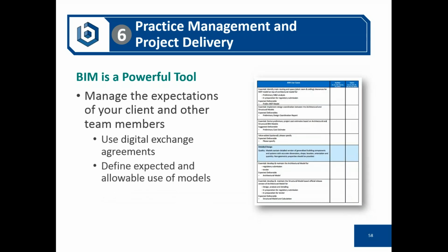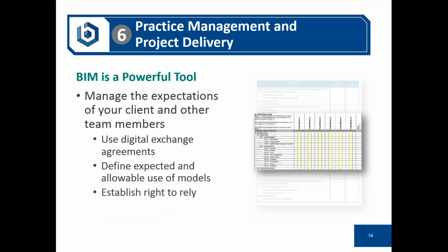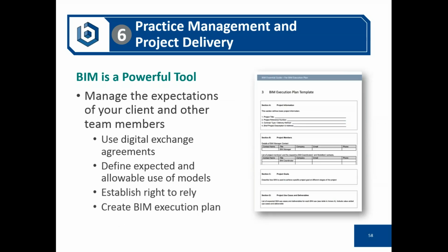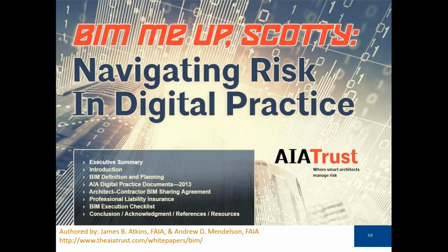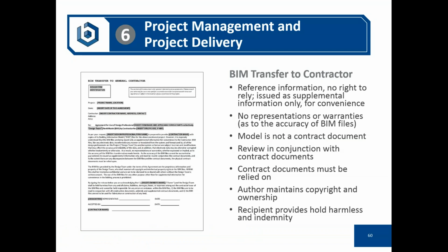You must have digital exchange agreements that define the expected and allowable use of the models, the right to rely on it, and you should also have a process to establish and work with your consultants on a BIM execution plan. BIM requires a higher degree of planning and coordination than did CAD. So here's a white paper that I co-authored with Jim Atkins that's published on the AI Trust site as well as our website.